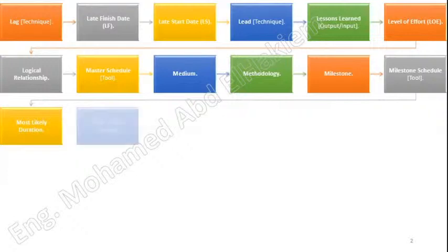Near-critical activity. A schedule activity that has low total float. The concept of near-critical is equally applicable to a schedule activity or schedule network path. The limit below which total float is considered near-critical is subject to expert judgment and varies from project to project.